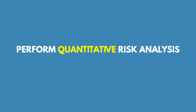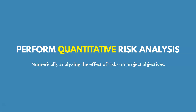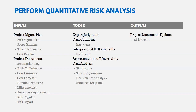Now let's talk about performing quantitative risk analysis — numerically analyzing the effect of risks on project objectives. Key inputs are the risk management plan and the risk register. Cost estimates, cost forecasts, and duration estimates are also inputs because you're determining the quantitative impact in terms of dollars and days.